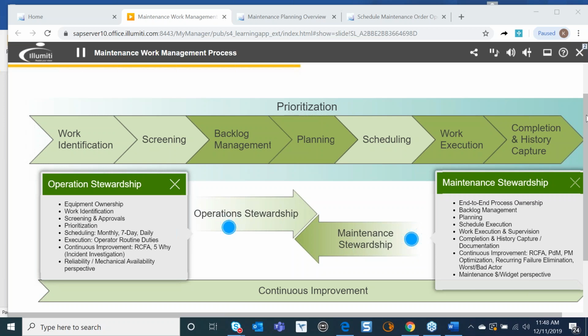Cost is definitely one of the absolute most important things that we look at in maintenance. And for maintenance labor and materials, we need to be able to have that information for what we're spending and how we're spending it. And that especially applies to our planned versus our unplanned work, right? Because unplanned work typically will cost 6 times more than planned work. And without having that visual information at your fingertips, it can't help you increase the reliability of your plant. So it all works very well together. There are apps specifically for that in real time that will give you that information on the outside of the tile and the flexibility to be able to have that data for your upper management and for yourself.